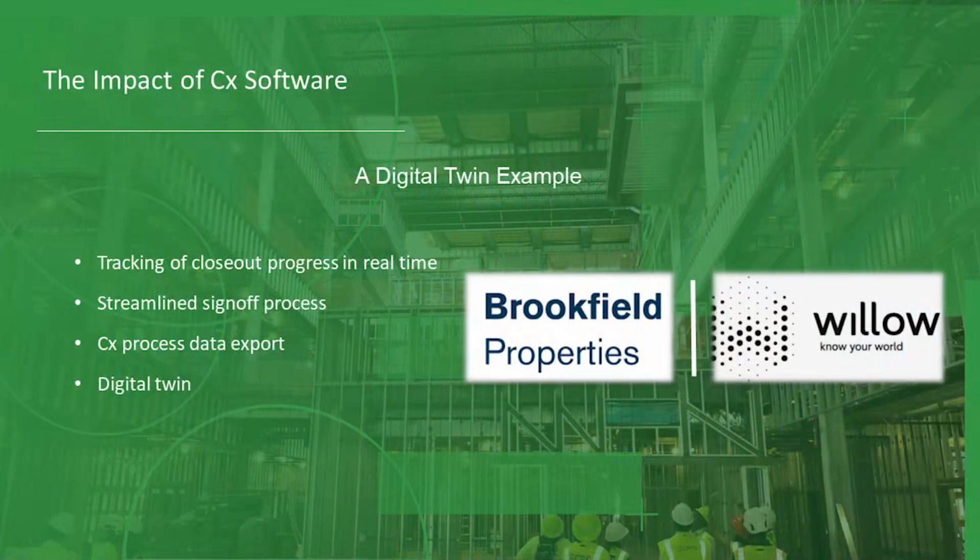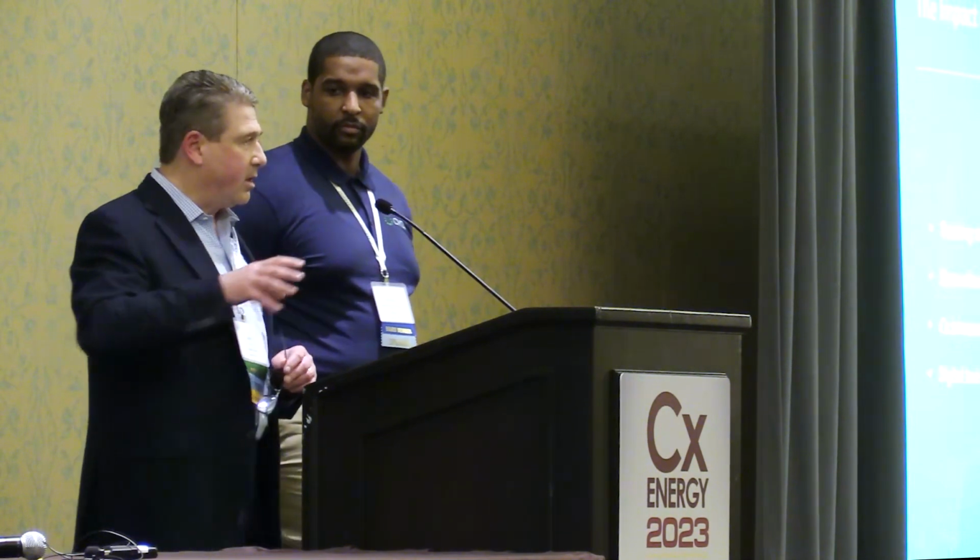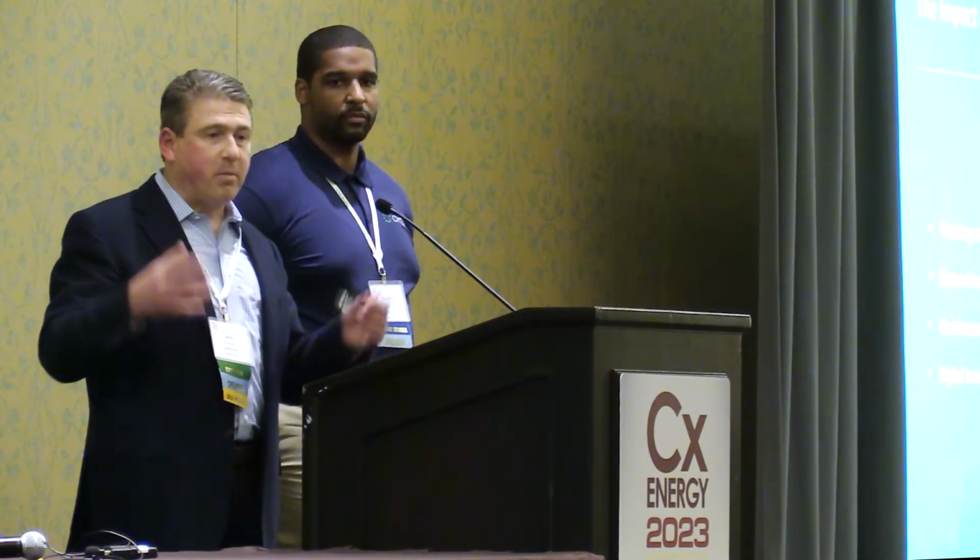A quick example. How many of you are familiar with digital twins? Right, so digital twins are a digital representation of the building that are connected to the data within the building. It talks to the meters, talks to the BMS system, and represents the actual operation of the building. So we have a client, Brookfield Properties, whose final deliverable or final product is the digital twin. So the digital twin gets populated with all the asset data, with all the data related to systems. They chose Willow as their digital twin provider. And the great thing about this client is that they've established the requirements from the beginning of the project, what the expectations are for the delivery of the building, right?